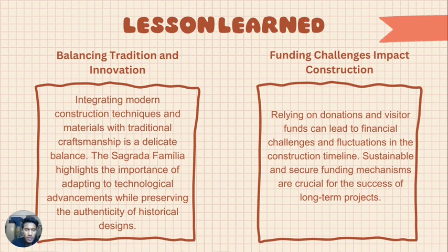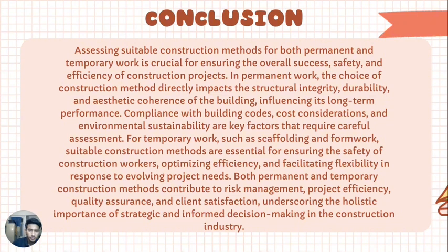And also, the second lesson that we can learn from this case study is that funding challenge impacts the construction. Okay, relying on donation and visitor funds can lead to financial challenges and fluctuation in the construction timeline. Sustainable and secure funding mechanisms are crucial for the success of long-term projects. Okay, and then the last one, the conclusion.